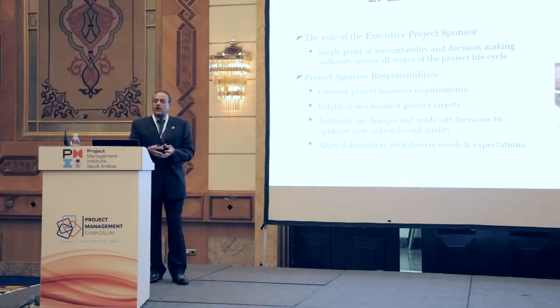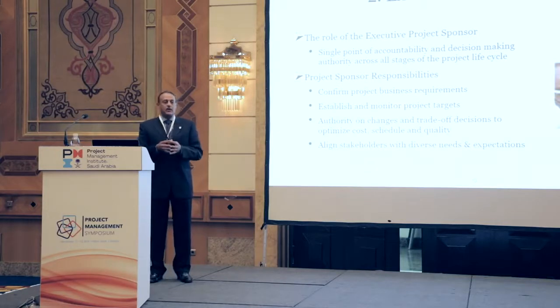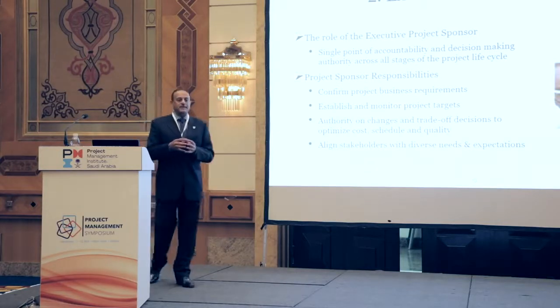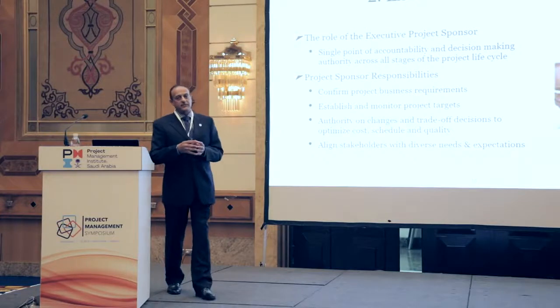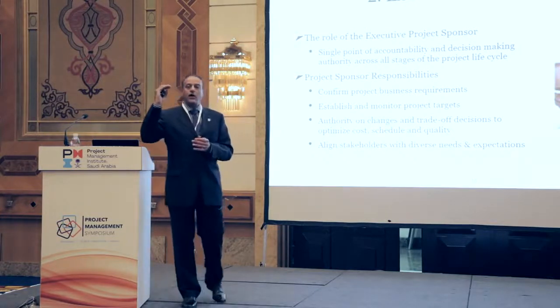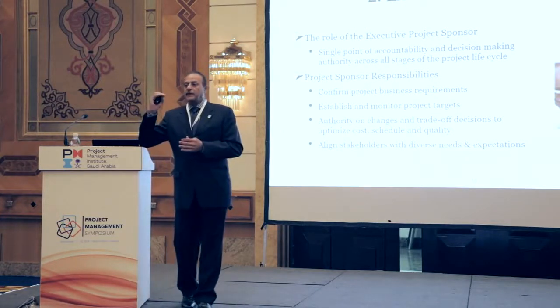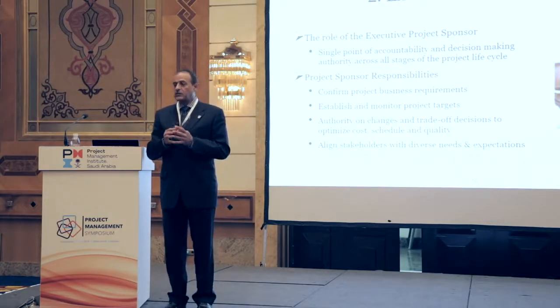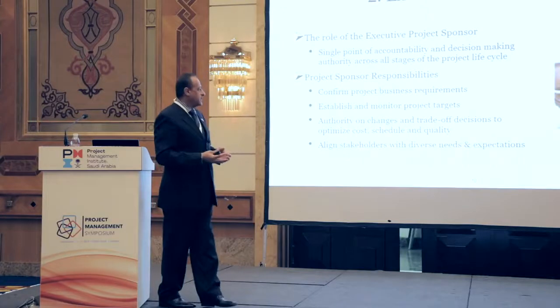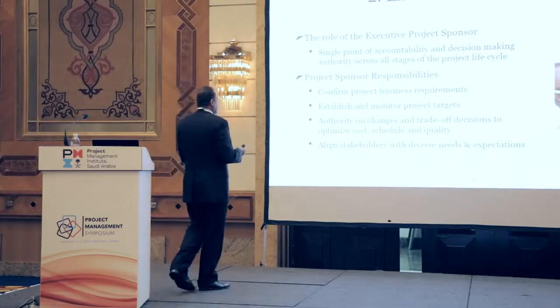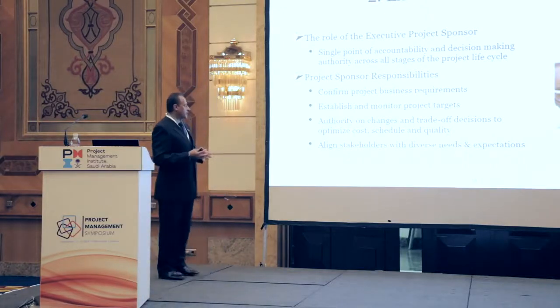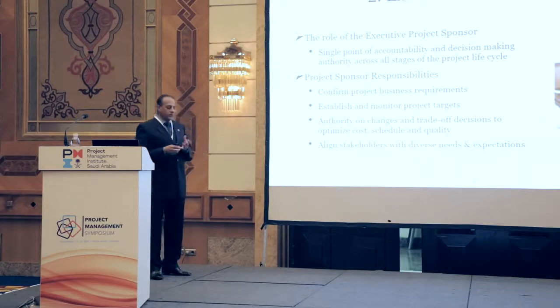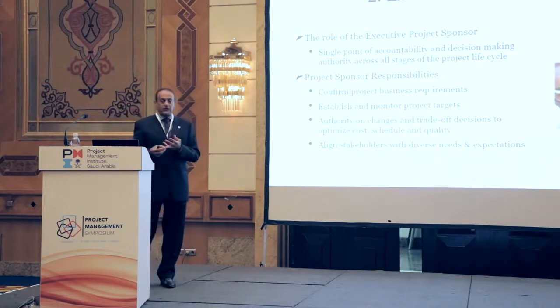Next, we go into the project level. Once you start a project, assign an executive sponsor. An executive sponsor is a high-level person who is going to own that asset. He knows why that business objective is built, why this capital project is being put on the company or organization to develop. So he knows the business requirement and the business objective. He sets the project's targets and he monitors them.